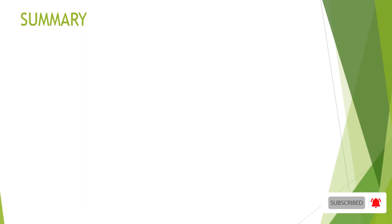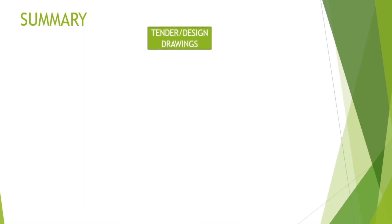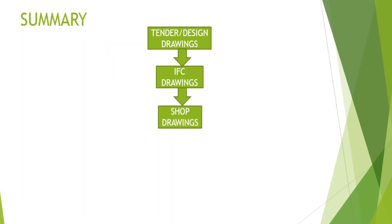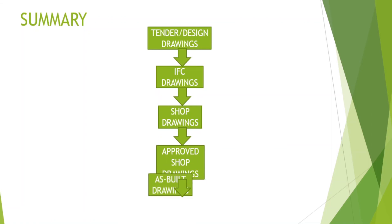Now let's summarize what we have gone through. The tender or design drawings is an official document in the tendering stage. This gets evolved into IFC drawings in the contract award stage and becomes an official document. These drawings get evolved into shop drawings in the execution stage. The shop drawings get approved and become an official document in the execution stage. Finally, the drawings evolve into As-Built drawings after work completion and become an official document in the handing over stage.